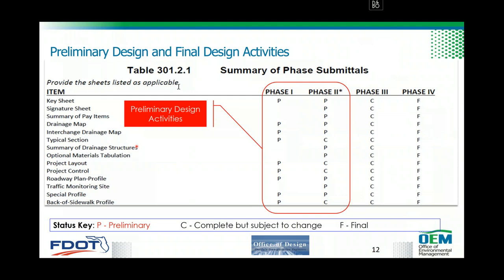About four years ago, we met with FHWA discussing their order on permissible preliminary engineering activities. They looked at our Table 301.21 from the FDM and told us that everything with a 'P' — indicating preliminary — can be categorized as preliminary design activities. So all activities marked 'P' are preliminary design activities and can be combined with PD&E study activities. Phase 3 or Phase 4 plans are not preliminary design activities — they are final design activities and should not be combined with PD&E.